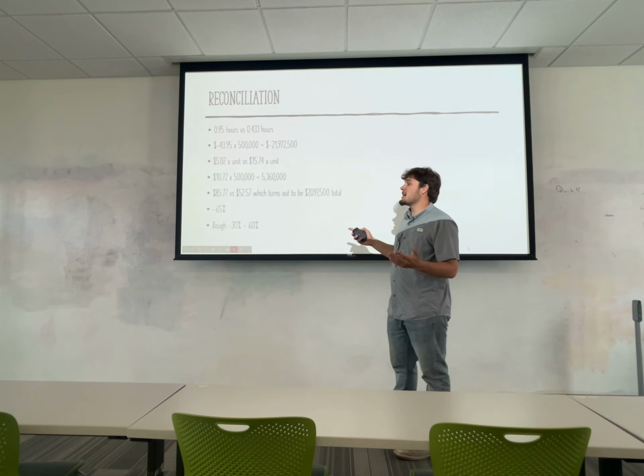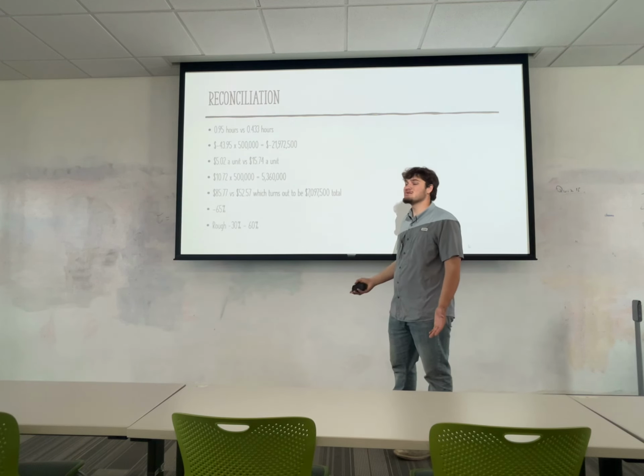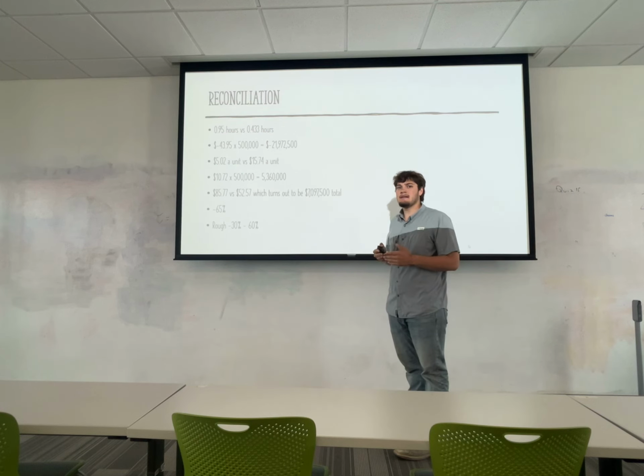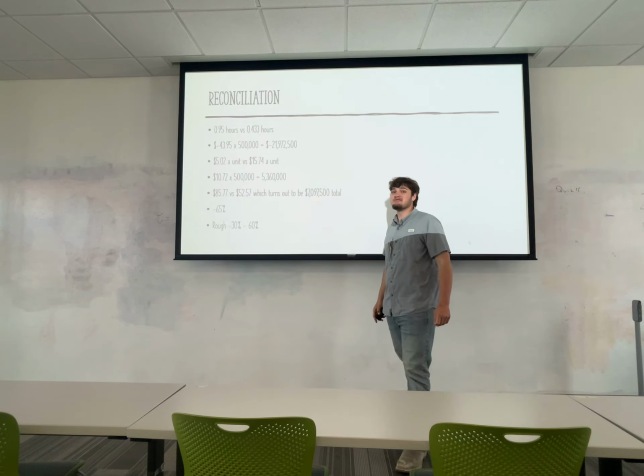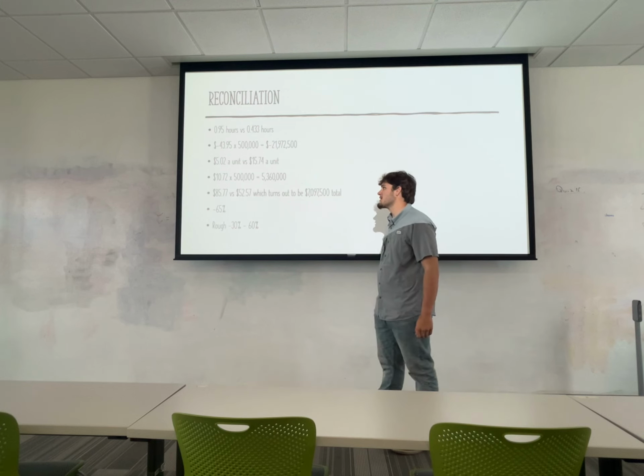But it turned out to cost me $43.95, which once again, not that bad until you multiply it by 500,000 units, which turns into costing me $21,972,500, which turns out to be a lot of money.